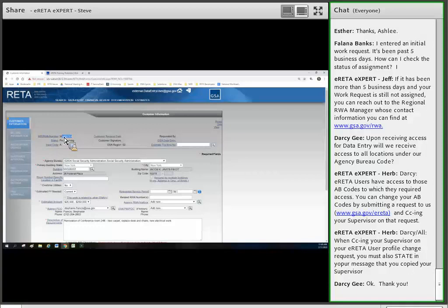First, you now have a unique tracking number tied to this work request. It has a W as the prefix, W equals work request. But this tracking number will be stuck to this project throughout its life cycle. So even after we accept this RWA, and let's say the W changes to an N type or F type or R type, for example, the 7-digit number after that will always remain the same. So this tracking number is given to you on day one and will always be tied to your work request/RWA.